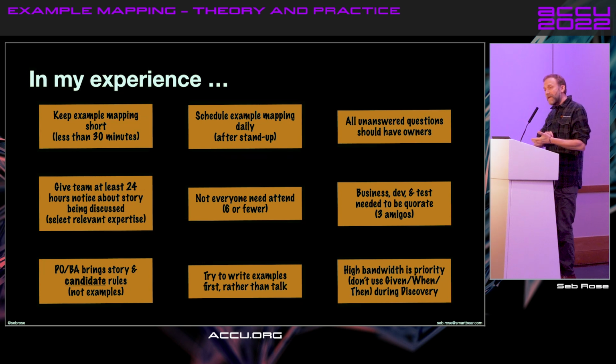And there are many different ways of writing examples on these cards, but one of the ways that I absolutely recommend that you do not do it is by trying to go straight to the Gherkin format of given, when, then, because that's a writing approach. That's a way of structuring it as documentation. And writing documentation is a completely different art and takes more time than we should be spending in a high bandwidth example mapping session.